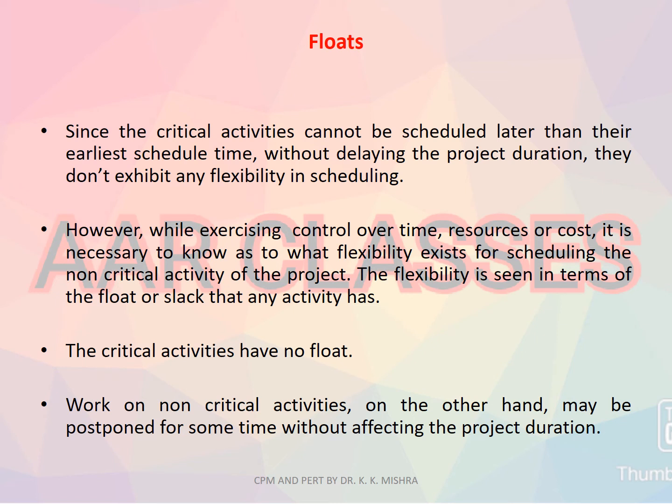However, while exercising control over time, resources or cost, it is necessary to know what flexibility exists for scheduling the non-critical activities of the project. The flexibility is seen in terms of the float or slack that any activity has. The critical activities have no floats. Let me make it very clear: work on non-critical activities, on the other hand, may be postponed for some time without affecting the project.